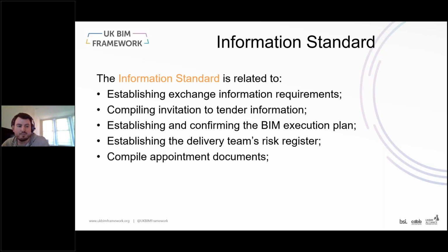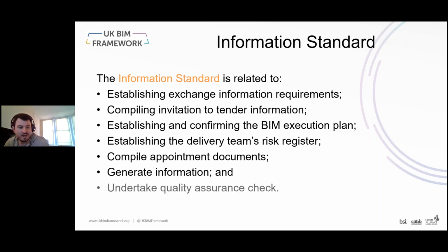The fact that when appointment documents are compiled, either by the appointing party when they appoint the lead, or when lead appointed parties appoint their respective appointed parties and task teams, they will compile these documents together, which includes the information standard. It's used when anyone generates information on a project, thereby being able to reference things like key code to file naming conventions, reference which classification systems are being used and other elements.